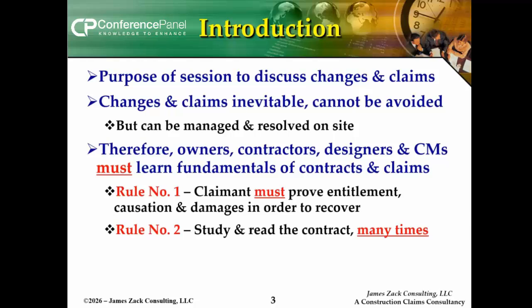Way too many owners and contractors, in my experience, scan that front-end legal stuff once maybe, and then get down to the nitty-gritty details of whatever trade they're working on, mechanical, electrical, whatever. The trouble is you don't make any money off of the technical specifications. If you want to file an application for $1 million worth of electrical work done this month, you don't go to the electrical spec, you go to the general conditions.